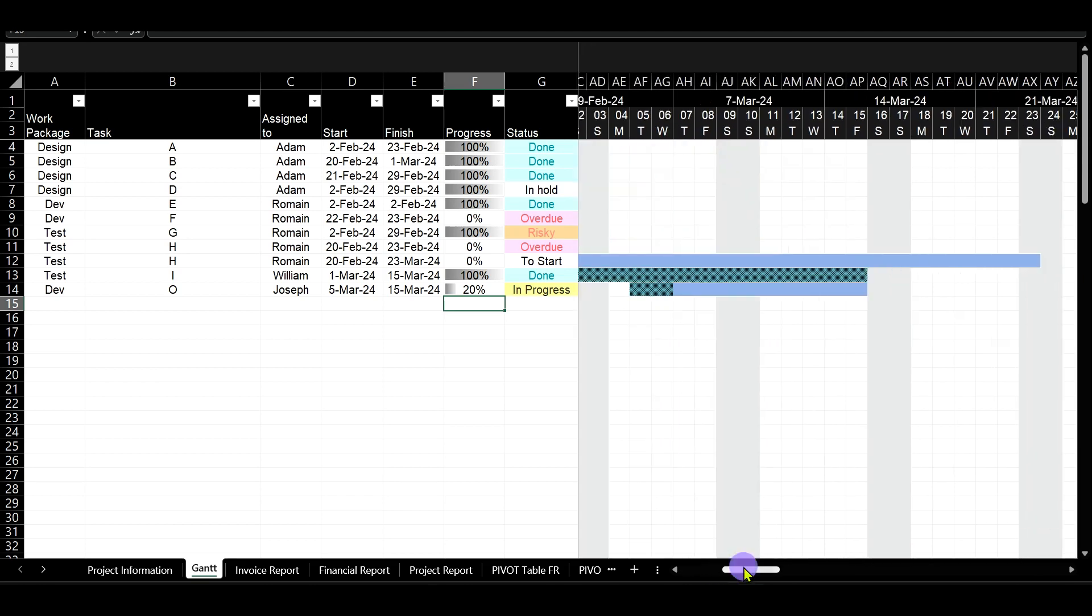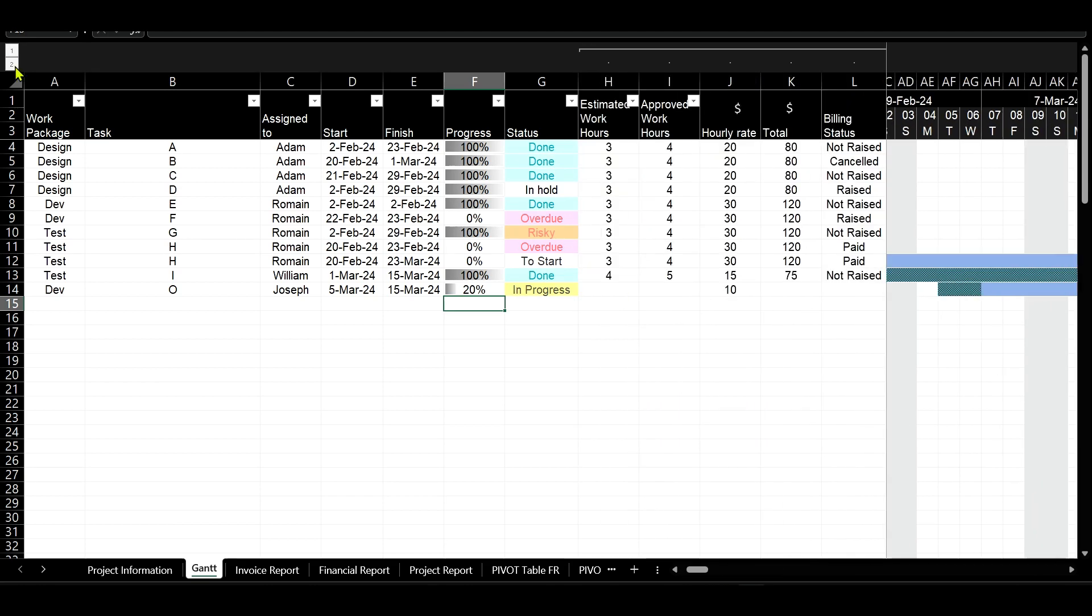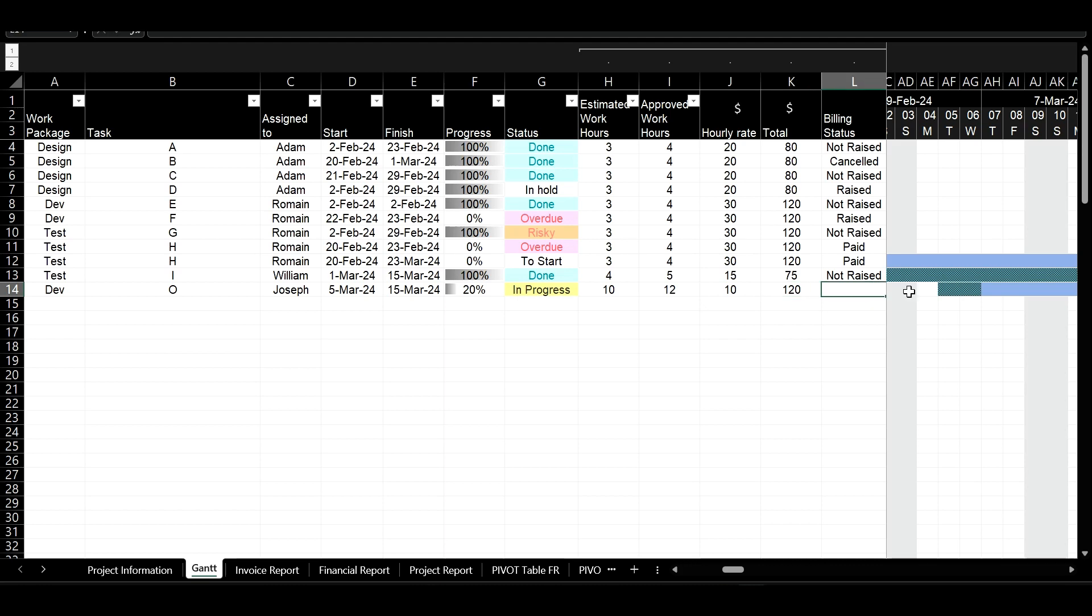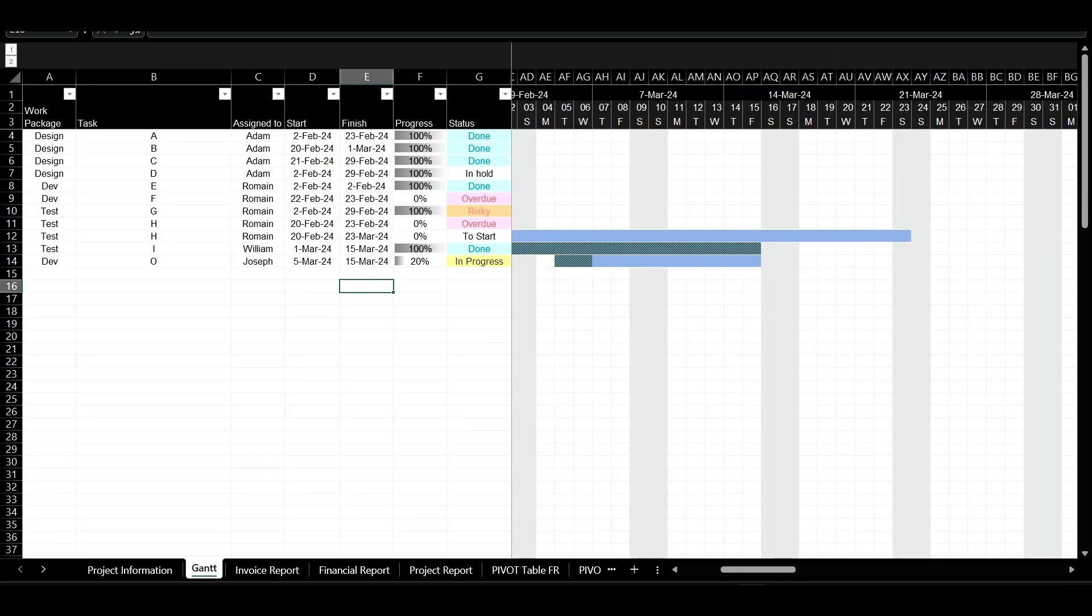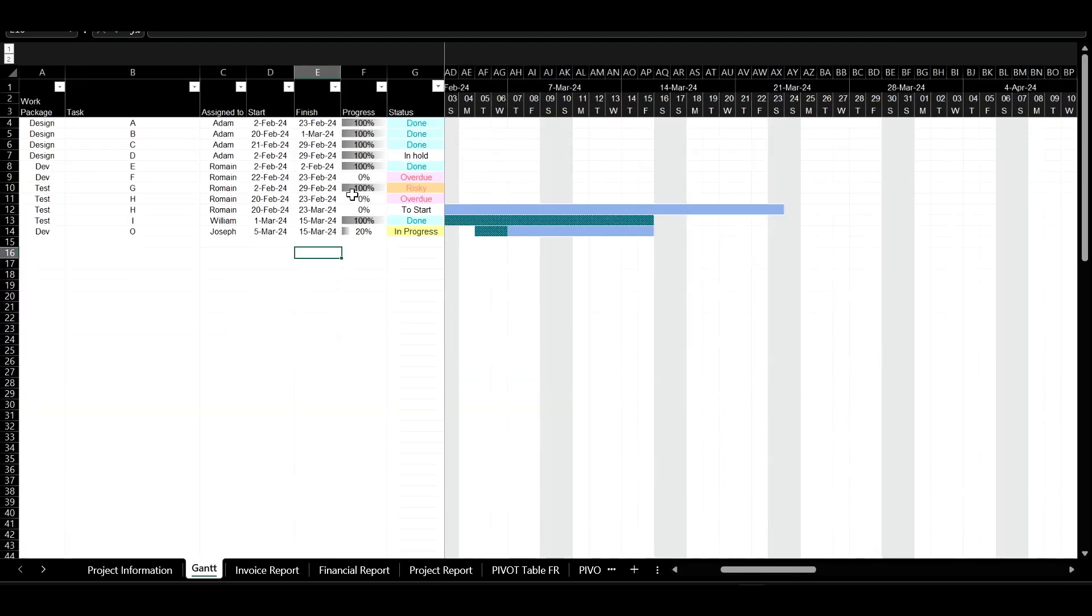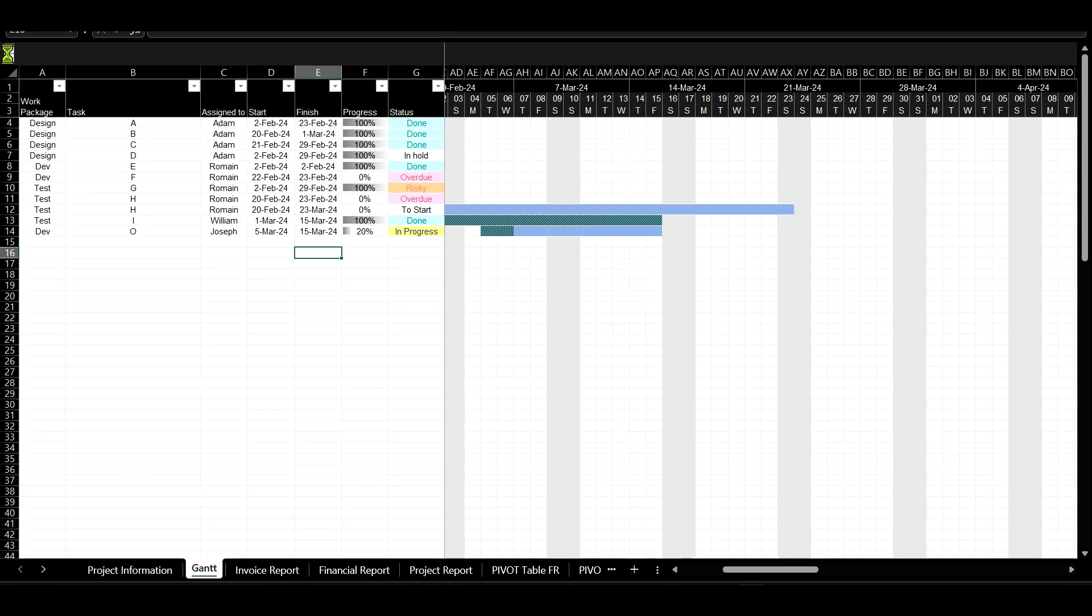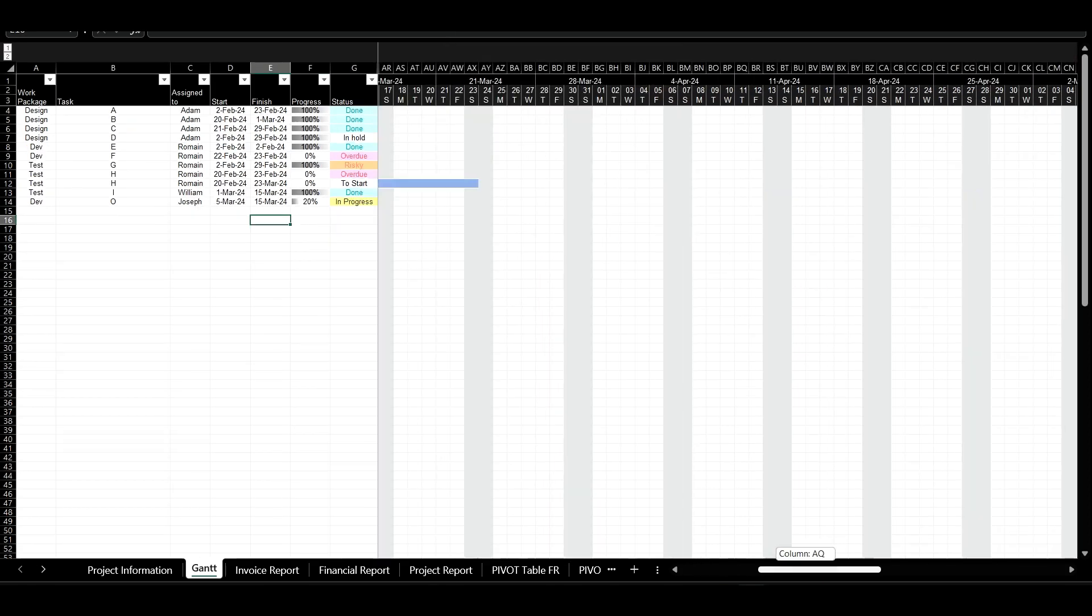Upon the completion of a task, I promptly update its progress, record the approved number of hours spent, and adjust the billing status accordingly. The Gantt chart plays a crucial role here, significantly easing the planning process by offering a visual progress overview.